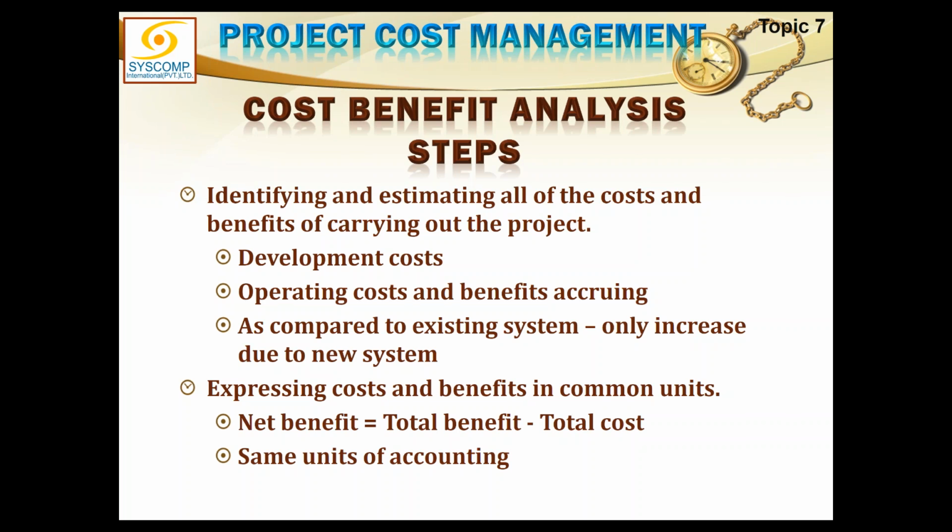So in cost benefit analysis, we want to be sure that whatever venture we are going to undertake should be beneficial for the organization as far as the cost is concerned. Whatever we invest into that project or venture must be able to yield more benefits than what the cost has been. So a normal formula would be: net benefit is equal to total benefit minus total cost. If the total benefits are more than the total cost, only then will it be called feasible.